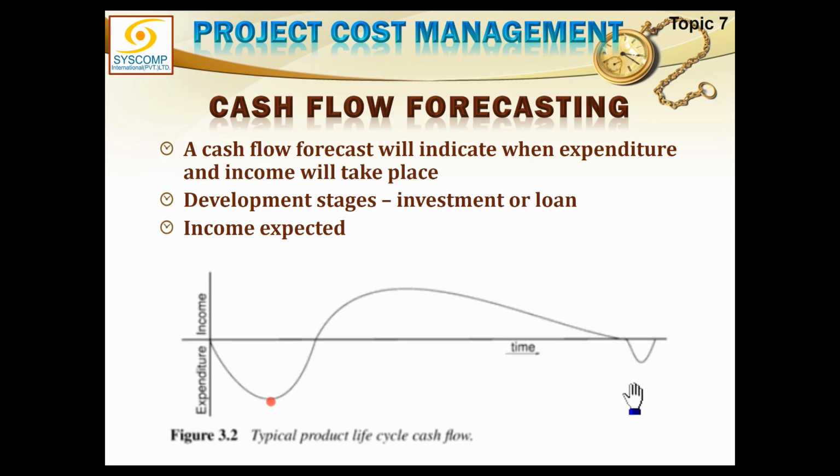And then I start going into a little better situation where I spend less and I get a little more than what I spend. So this graph starts going up, and over a period of time it will reach the point where my whole investment to date will be recovered, and this is called the break even point. From that point onwards your actual profit starts. Now your investment is less and your benefits are more. So you are going up.